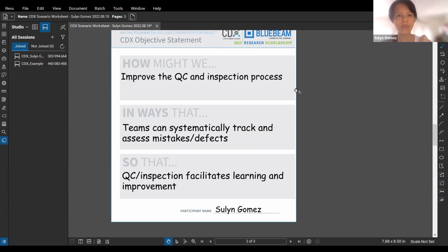It can be something very minor, like using the wrong fastener when I'm installing drywall. That's a small thing, and we might say that doesn't impact much in money. But if that wrong fastener was used on all the drywall walls in the hall on one floor, or on all the floors, that's a lot of time, and that becomes huge in money.